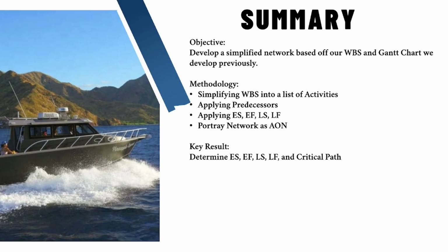Our methodology is to simplify the WBS into a list of activities, applying predecessors to those activities, then applying early start, earliest finish, latest start, and latest finish, and then portraying that network as an activity on node. Our key results are to determine earliest start, earliest finish, latest start, latest finish, and our critical path.